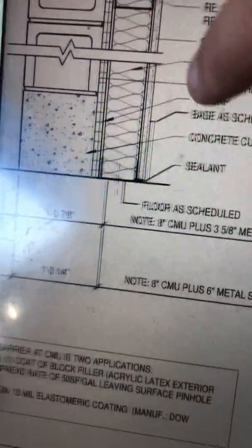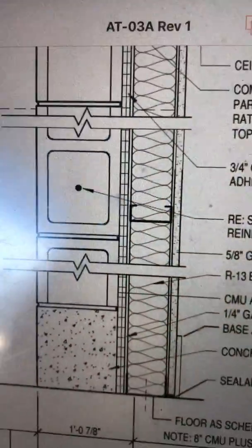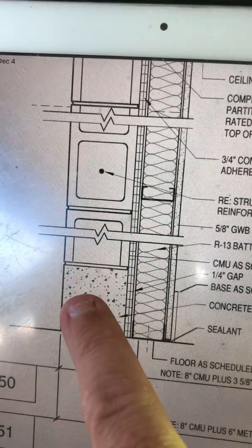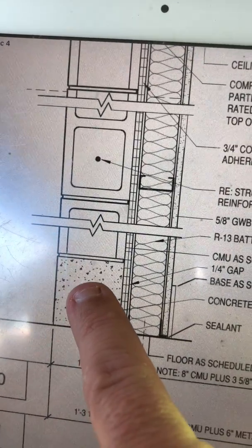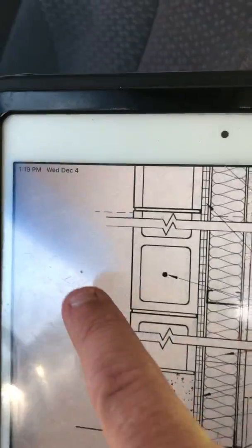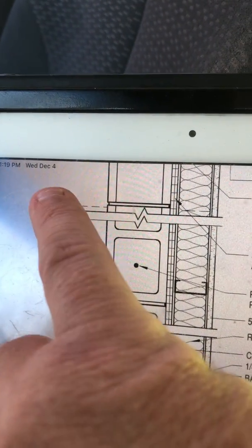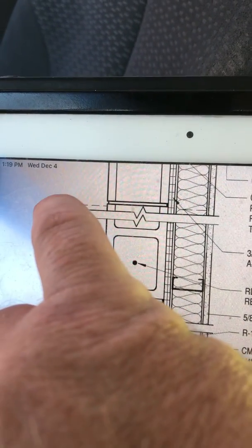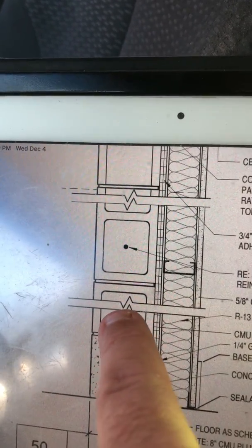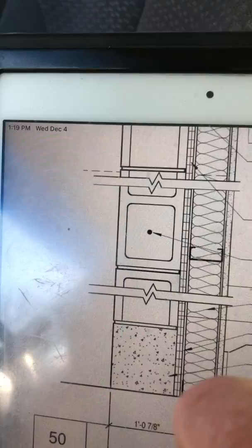And then you might have something like this, which happens quite often. What this is, there's going to be a concrete beam to start out. And you see how this isn't a full block? Well, you'll have a benchmark on the column somewhere, and you measure down what they tell you, and you might start out with that rip, and it'll tell you how big that rip is.